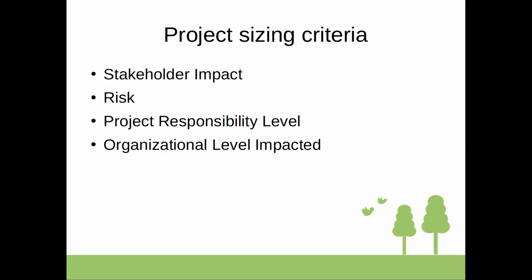You can apply sizing basically to decide what the main sizing criteria is. You can decide whether it's a budget or the cost of the project. If it's a cost, then you can just judge by the amount of money spent on this project. It can be the main factor deciding if it's a small, medium, or large project.